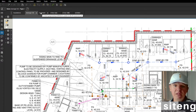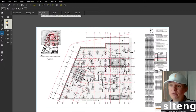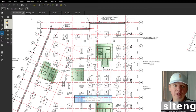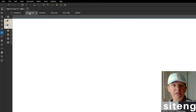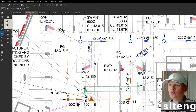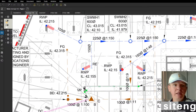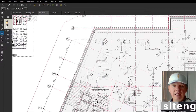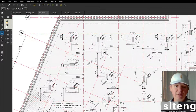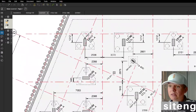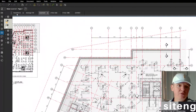Just to remind you, once we're going to be doing the groundworks and the drainage, we need three drawings with us at all times: the foundation drawing, which is the main one for the concrete; the drainage drawing, to see what the pipe is doing and when to install pipe while constructing the pile caps; and the basement drawing, which is very important for the column positions for starter bars and pile cap positions.